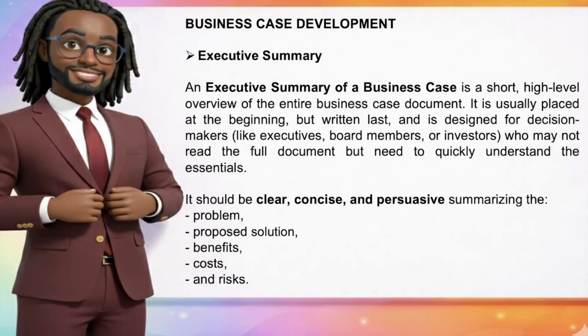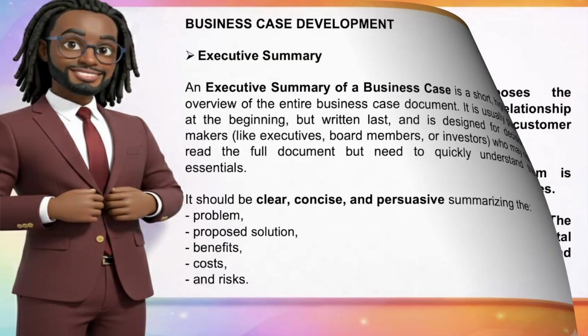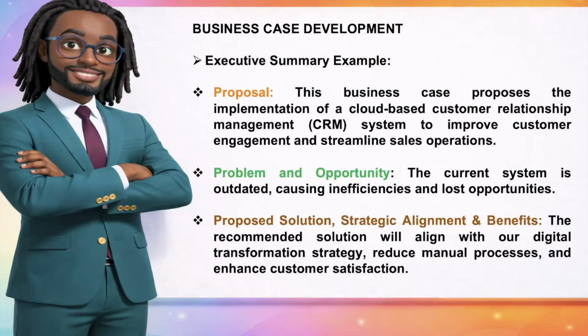The executive summary. This is a short, high-level overview of the entire business case document. It's usually placed at the beginning but written last, designed for decision makers who may not read the full document. It has to be clear, concise, and persuasive, summarizing the problem, proposed solution, benefit, cost, and risk. I will give you an example of the executive summary.